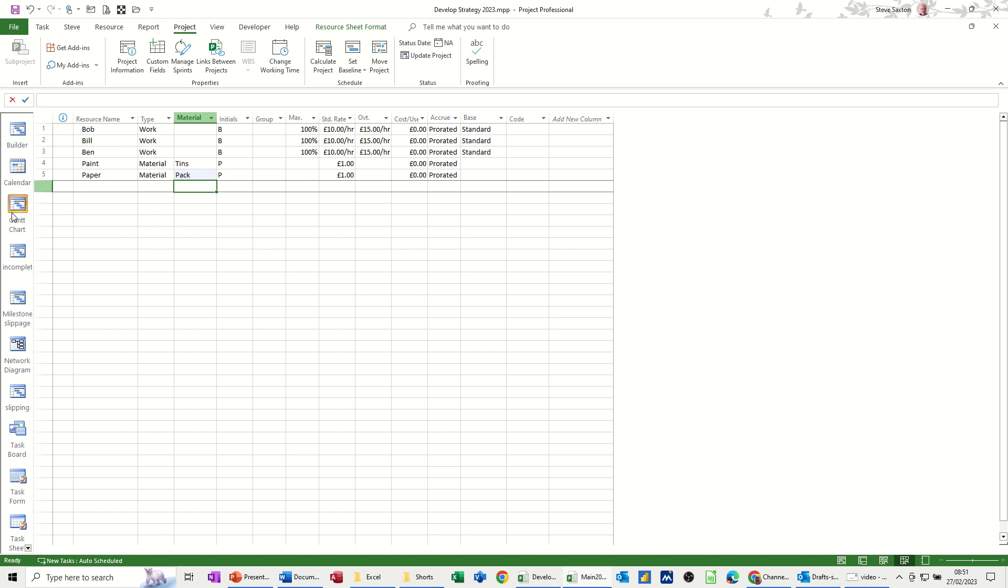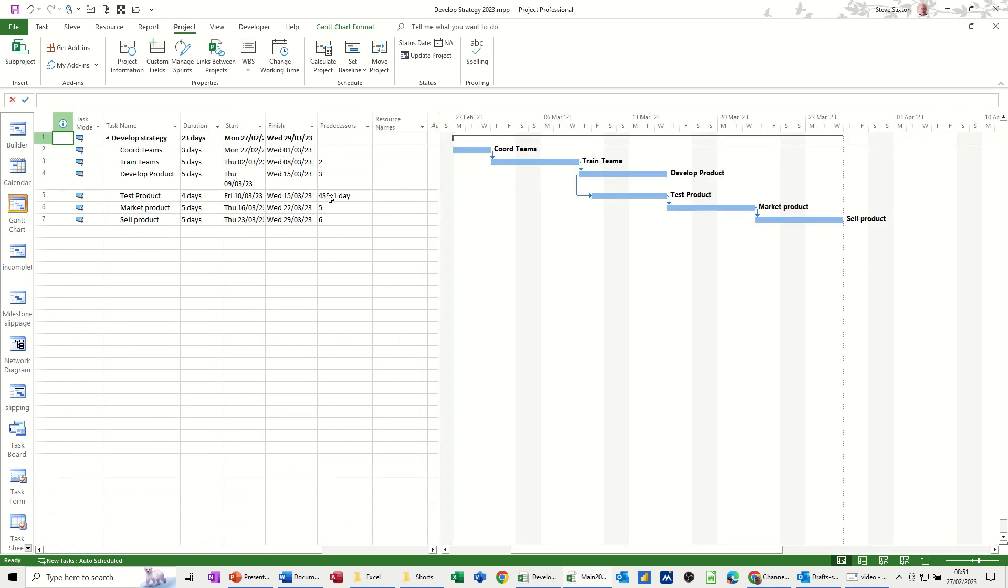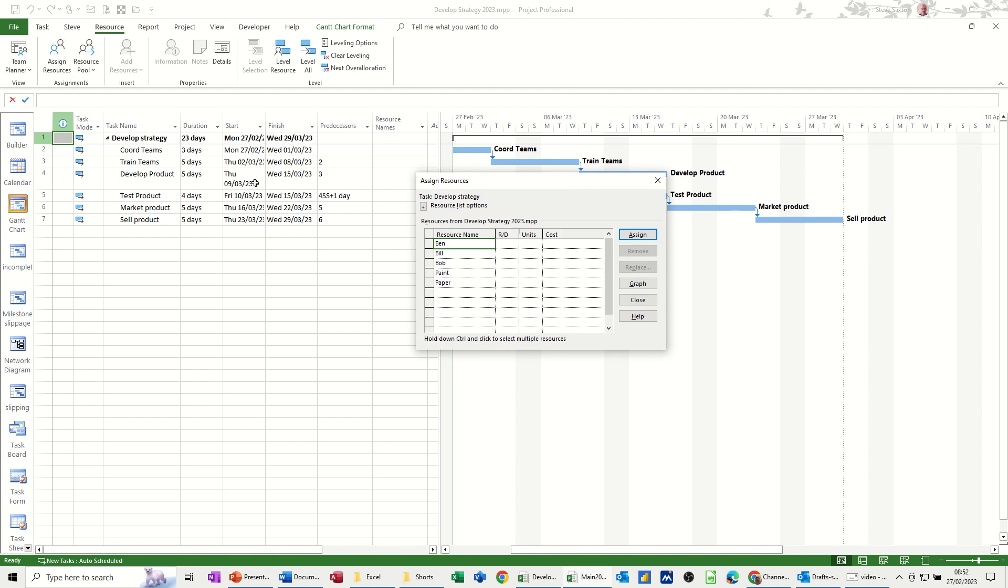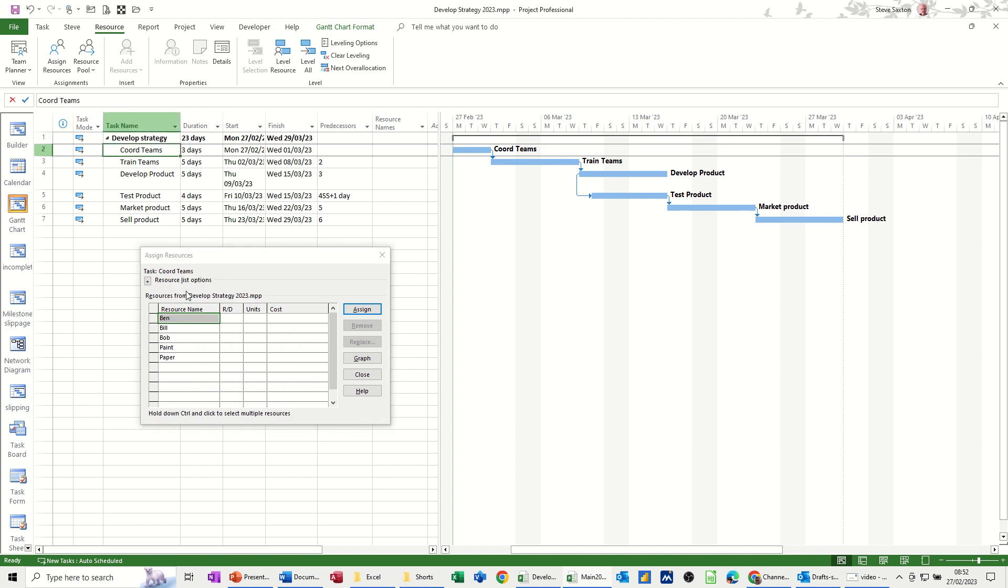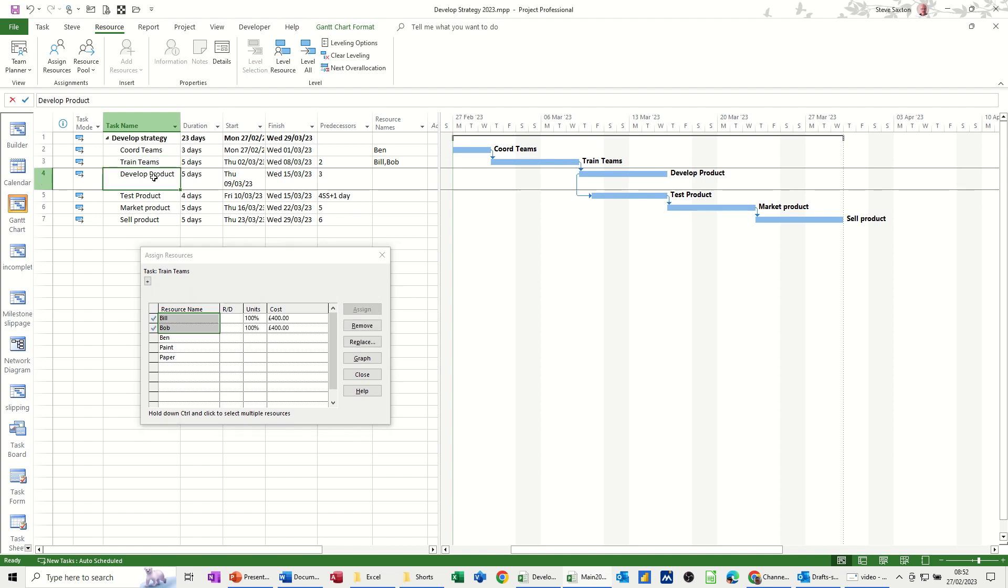So now I'll go back to the Gantt chart and allocate resources. So just move this across a little bit. Different ways of doing this, but I'll normally go through the resource tab and assign resources. Then you see the list of resources and you can allocate onto different tasks, individuals and equipment. So, quad teams, I'll just assign Ben to that. Train teams, I'll assign Bill and Bob to that. And develop product, I'll assign Ben to that one as well.